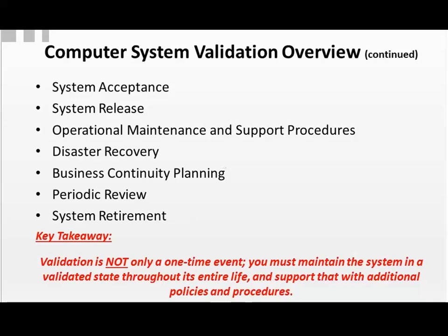The system release notification is something the steward of the system will issue, the IT organization or whoever is maintaining your system. It could also be in the cloud. You want to make sure that you know exactly when the system is released for production, so that you know the point in time at which data becomes valid data. Any data collected after that point in time is valid data.